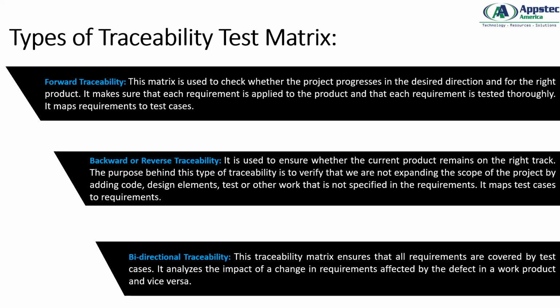Once your documentation is complete and you have your requirements in place, your development work gets started, and your traceability gets started. If it's a collaboration of 4 to 5 developers who are creating a bot, traceability becomes very, very important, because you keep track of each and every activity being allocated. If we have a project where four developers are creating the bot, the entire solution has definitely been segregated among 4 people. The 4 developers are individually working, so the integration of the code is very important. Developer one's activity should not be repeated by developer two, because that's a waste of time.